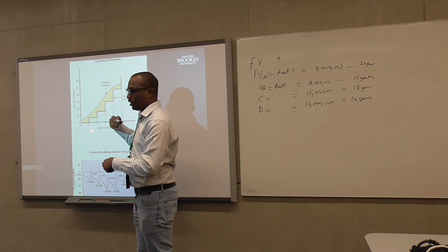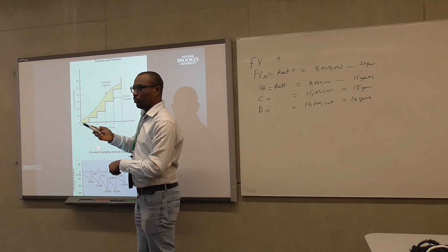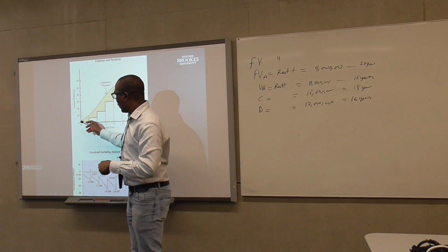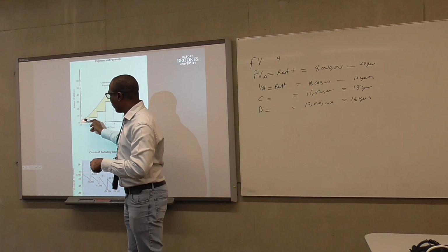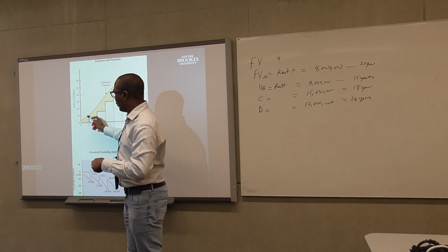But normally, the contractor works for a month, he submits a valuation, the next month it's processed, and usually it takes about 2 months for the contractor to be paid, right? So normally, if you do a value of work of, let's say, £500,000 here, by the time the client pays you that £500,000, you may have done additional work, right?